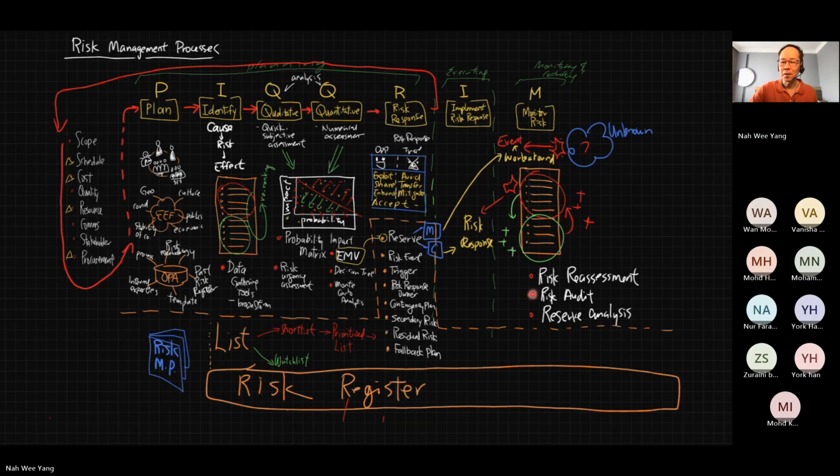And as we are looking at these identified risks, what happens to the unknown risk? Right? Maybe one day it happens, right? And you see this unknown risk, when it happens, it becomes an event. So how do you deal with an event? You use the management reserve. There's something you call the workaround, and this workaround deals with the event itself. Okay, so a workaround is something like firefighting that deals with an event. An event is like a fire.